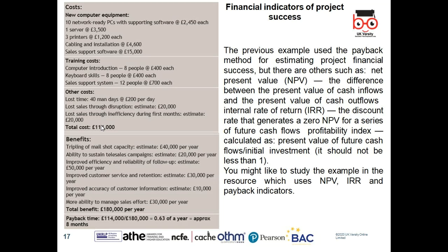The benefit you have 180,000 and the cost you have 114,000. So you go ahead, because although you're not making a great profit in the first year, it would be free thereafter for every year after that. Well done. So always we need to look around and learn from it. And this is called appraisal. We need to appraise it.